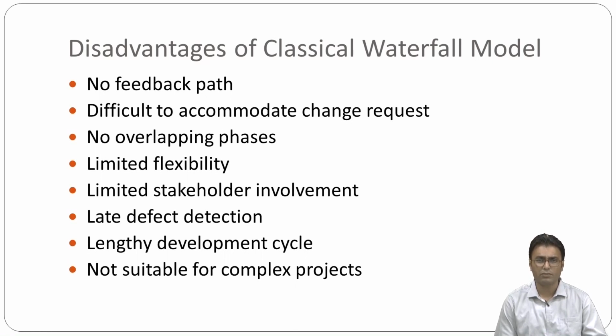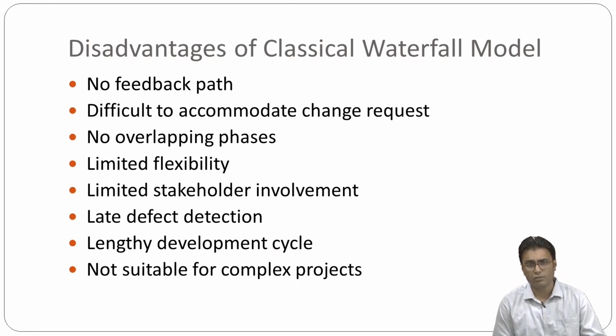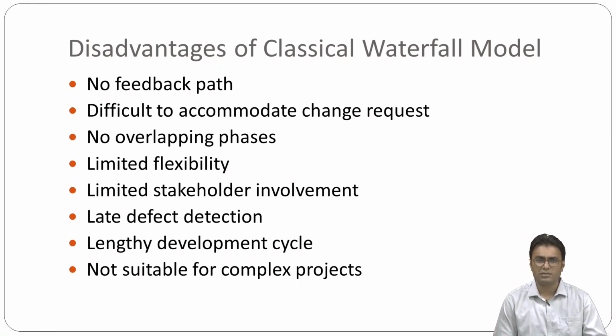Then the next one is no overlapping of phases. This model recommends that a new phase can start only after the completion of the previous phase, right? But in real projects, this can't be maintained. To increase efficiency and reduce cost, phases may overlap.